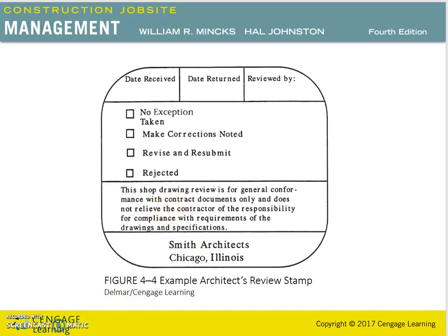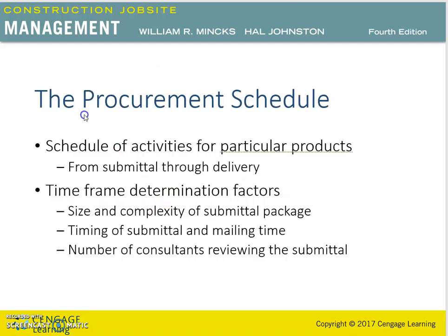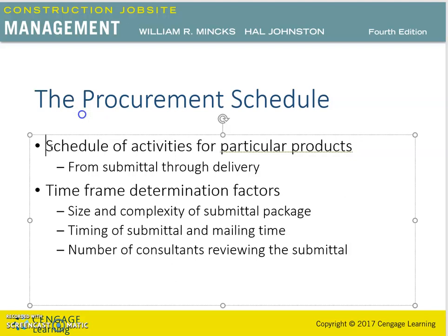Okay, so now let's talk about the procurement schedule. The procurement schedule is a schedule of activities for particular products from submittal through delivery to the job site. The contractor will coordinate the submittal schedule with procurement and installation schedule requirements to ensure that the product will be delivered to the job site to coincide with the appropriate installation activity.